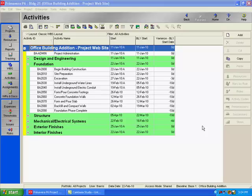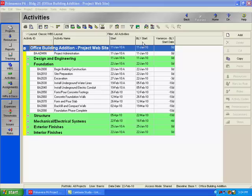For our example, we are going to monitor the activities in the Foundation WBS element for start date variance in days. This parameter will generate an issue if the difference between the activity's baseline start date and the activity's current start date fall outside of your threshold tolerances. A negative value for start date variance would denote that the current start date of the activity is later than the primary baseline start date. I've added columns to my layout to display the current start date and the baseline start date. We can see that most of the activities under the Foundation WBS element started late.